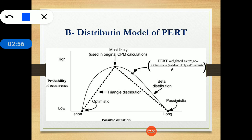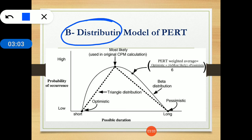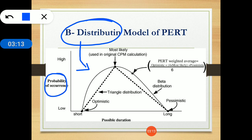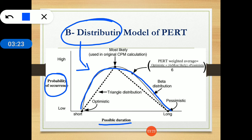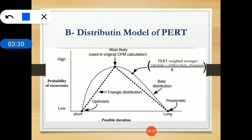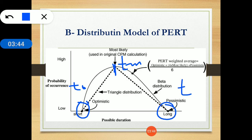In the PERT method, activity time always follows the beta distribution. In this figure you can see this distribution — it is called the beta distribution — where the y-axis shows probability of occurrence and the x-axis shows possible duration. This is also called the standard normal distribution curve. The optimistic time is shown as TO, the most likely time TM is at the middle, and the pessimistic time TP is at the other end.